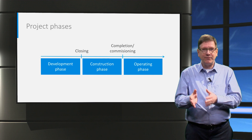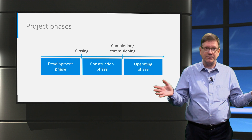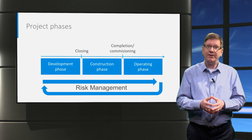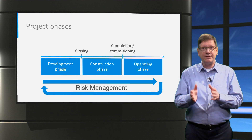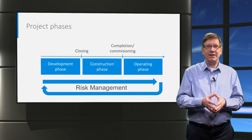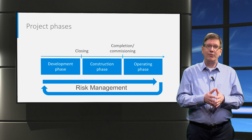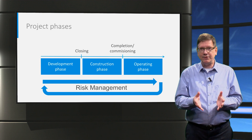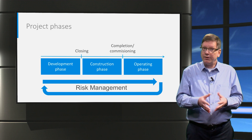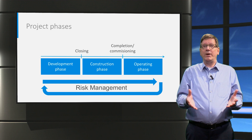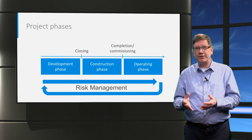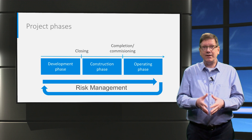Risks can occur at different moments and in all these phases. Risk management is therefore a dynamic process that needs to take place across all project phases, meaning it needs to be repeated from time to time. Risks and possible risk mitigations will change as the project progresses. For example, construction risks will have fallen away once construction is completed, and there may be new insights and technical developments that can be taken on board when they occur.